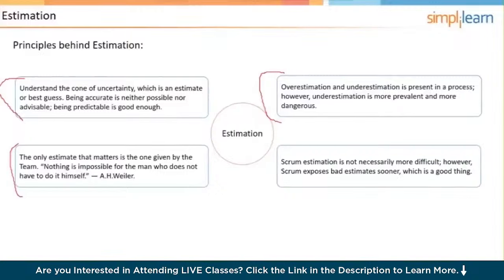And by looking at our velocity from iteration or sprint to sprint, there could be some information that is showing us that we're underestimating, for example, meaning we're thinking the user stories are smaller than they are, and that we can get a certain number done in a sprint, and then there's a fail. That would be discussed during the retrospective, and then we would do something different going forward, which might include doing some re-estimating.